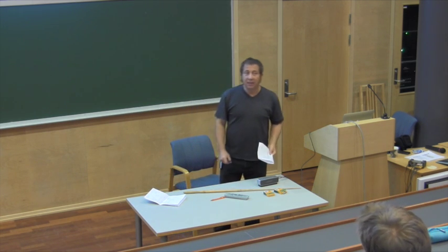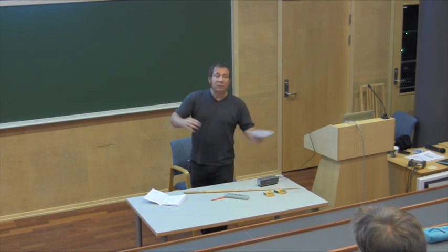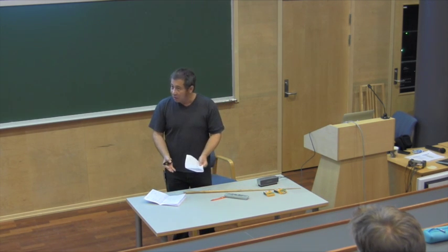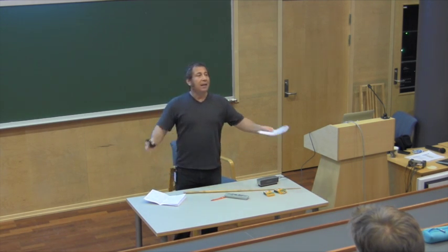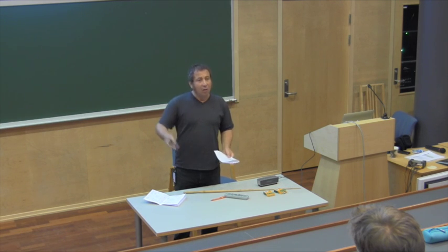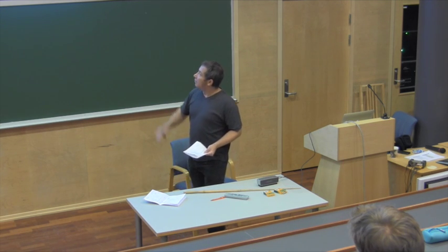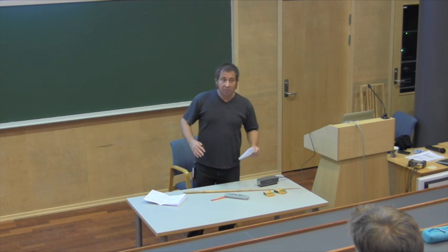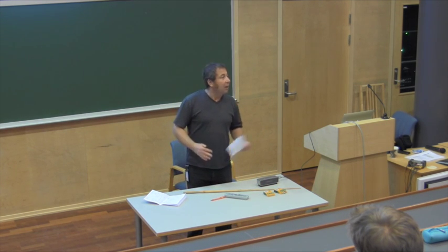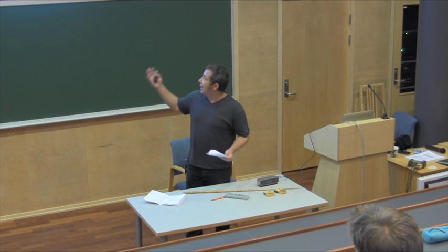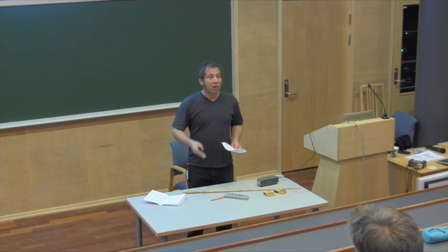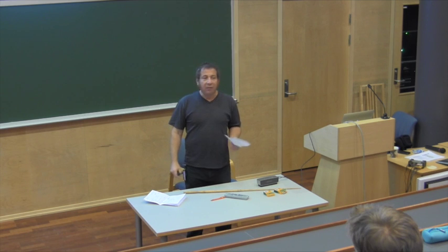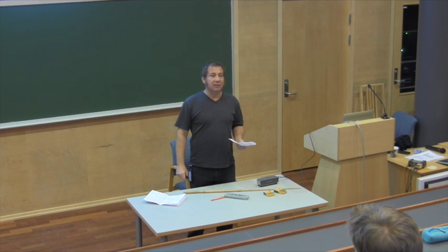But again, here, because of different contexts, different risk factors, different people, different structure, right? The uncertainty is also quite high, as you can see, about 15%. But there is the third model, which is a very exhaustive, time-consuming model, which we tend to call the analytical, or the definitive. And as you can see, it has about 5% uncertainty.